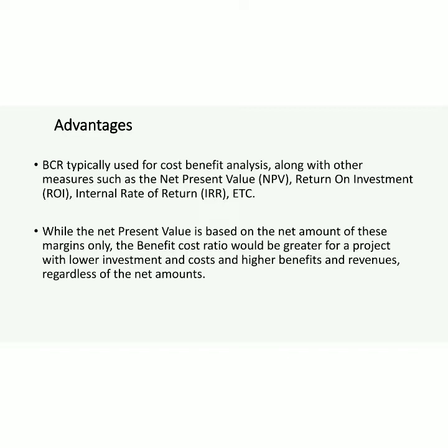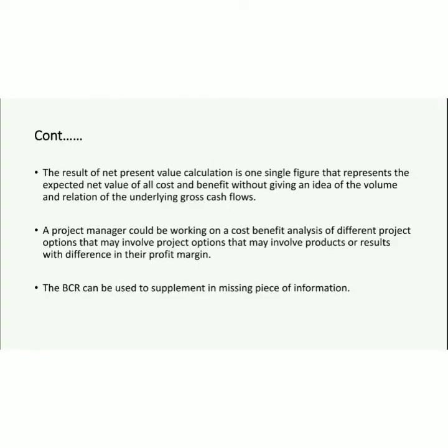Some of the advantages of benefit cost ratios are: it is typically used for cost benefit analysis along with other measures such as net present value, return on investment, internal rate of return, etc. While the net present value is based on the net amount only, the benefit cost ratio would be greater for a project with a lower investment and cost and higher benefits and revenues, regardless of the net amounts. We can also say that it shows the extent to which the present value of the benefit exceeds that of the investment and cost.